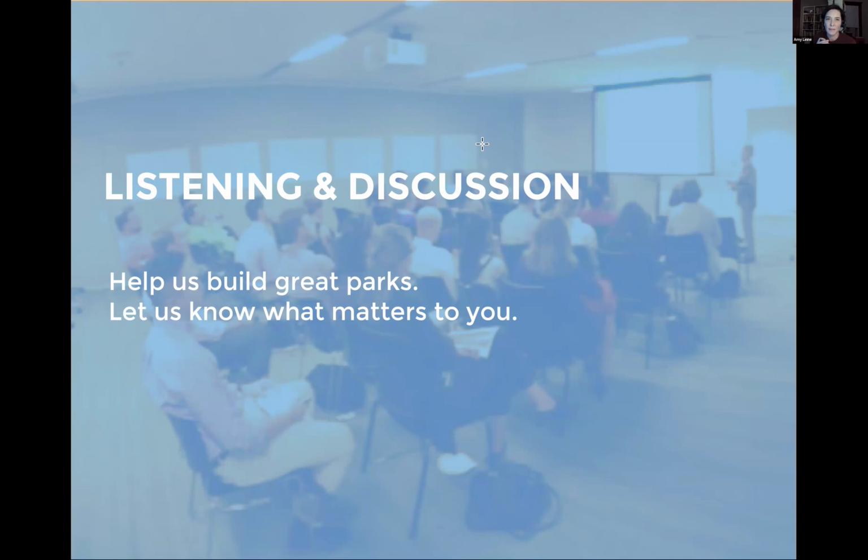Yeah, thanks for that question. I think the reason for these more short-term safety improvements are really just to eliminate the hazards that are out there. But the reason for sort of deferring the bigger improvements and moves are really kind of considering the other projects happening at the park. So understanding that White Stadium, that project is certainly going to have a big impact on the park overall, the overlook.